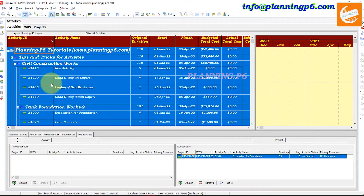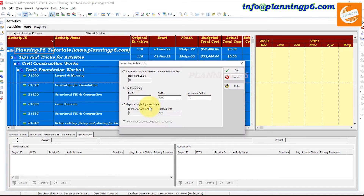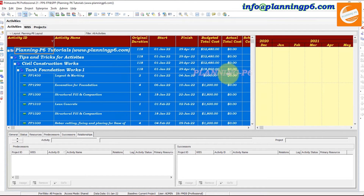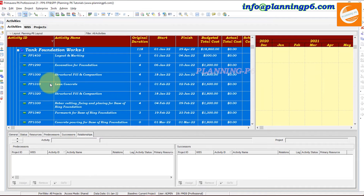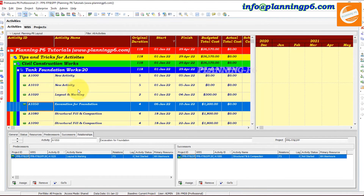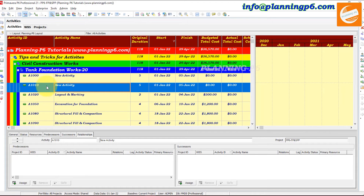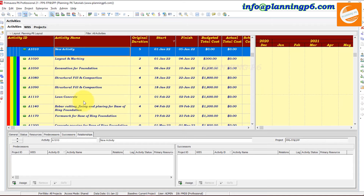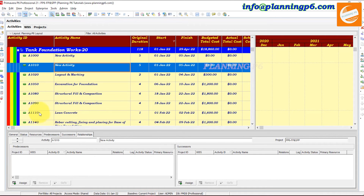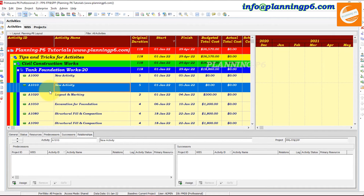To renumber all activity IDs, press Ctrl+A to select all activities, then go to Renumber Activity IDs. You can set a prefix — for example, 'PB' — and define the increment value, such as 10 or 20. Click OK and now you can see all activity IDs have been renumbered with the new prefix and increment as per your setup. You can manage specific activities the same way by selecting just that activity before renumbering.